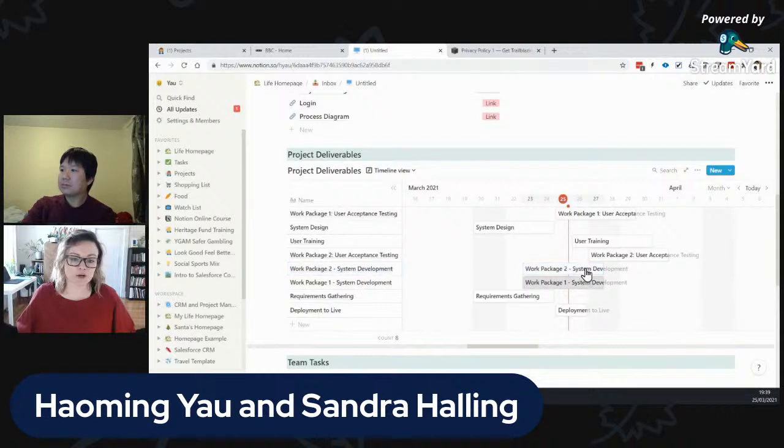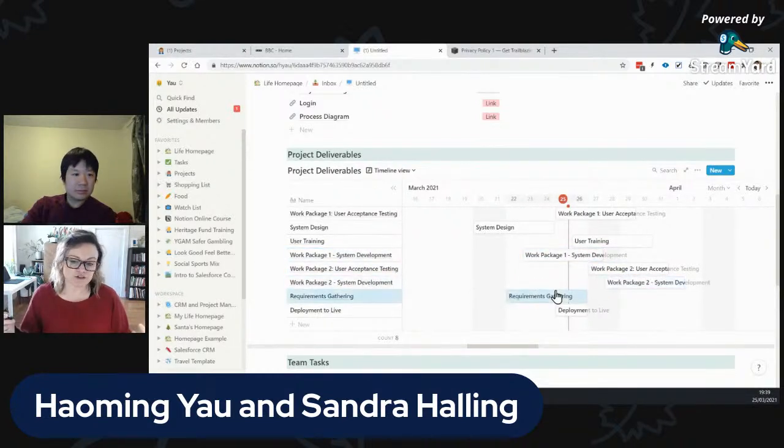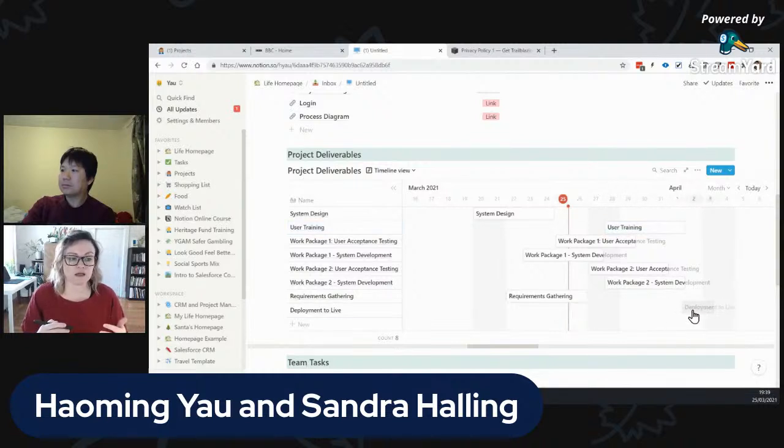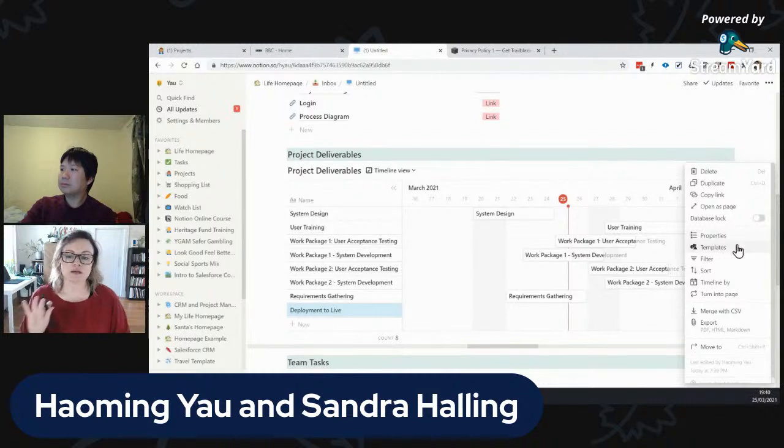So if you've got a year-long project where phases are taking several months to complete, that's a very different thing than having a 12-week project where there's 2 phases, maybe 3, but you're really operating at a more weekly level. So I think project duration, the number of people on the team, how detailed the tasks are getting, all of that play into how you would want to set up your timeline view to make it the most effective. And I think being smart about what you're displaying on the left in the table versus what you put on the right in the timeline view itself can really make a difference.